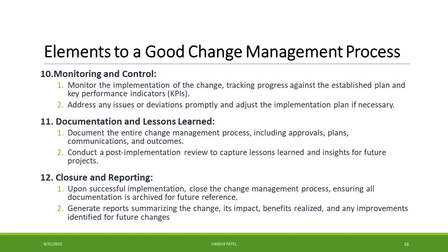So, document the entire change management process, including approvals, plans, communications, and outcomes. Conduct a post-implementation review to capture lessons learned and insights for future projects.